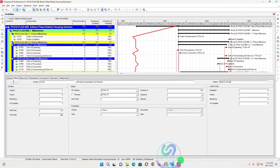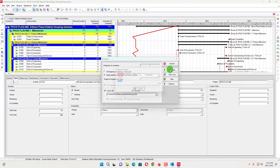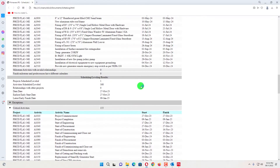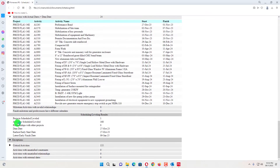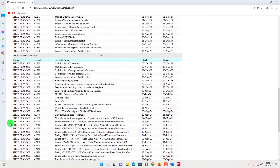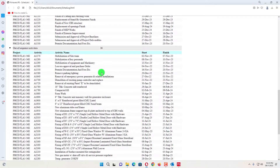We have a project and in this project there are a lot of out-of-sequence activities I have just created to show you some examples. I will apply the schedule and then go here and view the log. When we go to the view log, we will see at the bottom out-of-sequence activities and critical activities. We find out there are 36 out-of-sequence activities. This is the list of out-of-sequence activities.